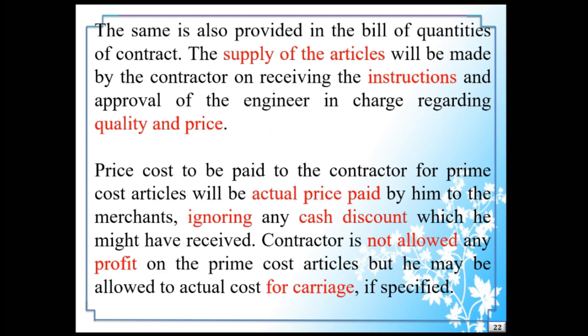The same is also provided in the bill of quantities of the contract. The supply of articles will be made by the contractor on receiving the instruction and approval of the engineer in charge regarding quality and price.